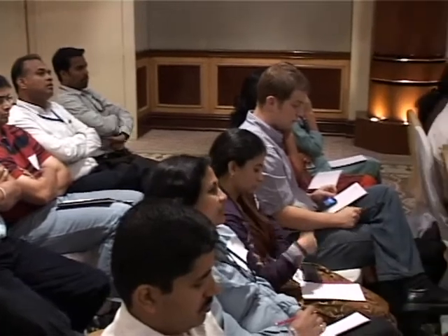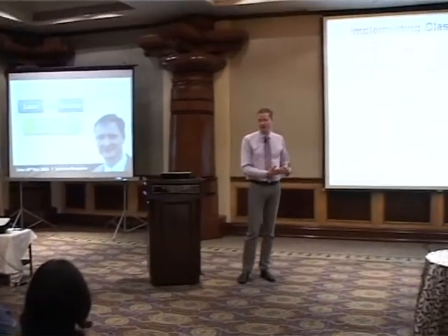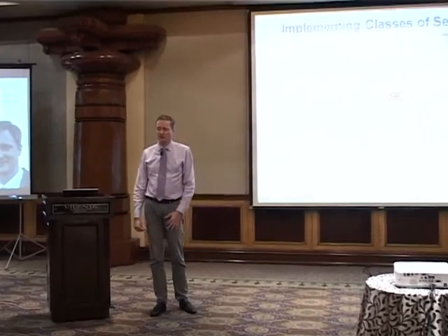Yes, question. I am going to come back to that picture in a later slide, a different version of it. The columns are determining the Kanban system, and what this is doing is just allocating the capacity of those Kanban. So yes, the columns take priority over the rows, and the rows are providing a recommendation of how we should replenish the system. And you may want to take that recommendation more strongly or less strongly depending on particular business conditions.